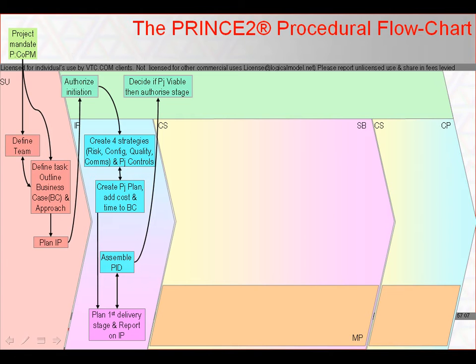And the initiation stage results in the production of a decision support package called the Project Initiation Document, or PID, as described in Appendix A, Template A20. The PID is a collection of many elements, like the A1 Benefits Review Plan, and is accompanied by things like the A9 End Stage Report and the A16 Next Stage Plan.